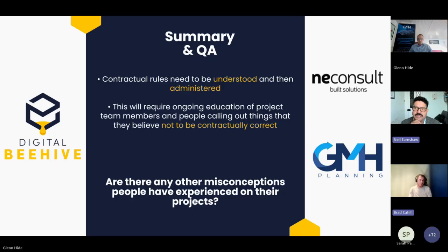So quick summary then. I might just be able to answer Liam's question very quickly, Brad. Go on then, Neil. In like 10 seconds: reading into what you've put, Liam, it sounds like you've got an issue with defects. If you've notified the defect to the subcontractor and they fail to correct it within the period required by the contract, then you can assess the additional cost of having somebody else correct the defect. That's a simple mechanism there. Sorry, Brad, I'm done now.